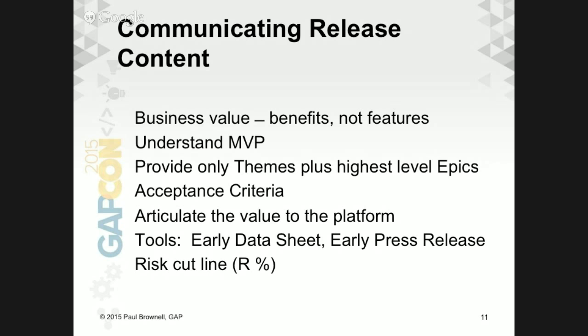And during delivery of the product, I recommend that a product owner reevaluate that. Look at how the team is doing against the release plan, and figure out what's the risk of meeting that cut line. Is the velocity looking pretty good? Looks like we're delivering everything and it's stable and we'll meet that, or we've run into some roadblocks, so I need to move my cut line up a little bit and maybe start taking part of plan B and putting it into effect now. So it's a tool that I recommend starting here and then implementing as well once you add the detail into the release plan.